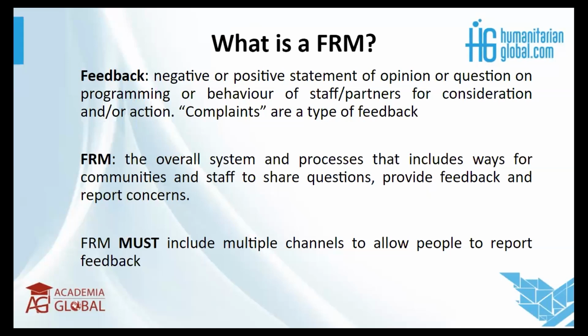It's important to make sure that we have communicated what has been done. Where there are queries such as why have I not been included in certain lists, you still communicate that there are certain criteria, both inclusion and exclusion criteria, that are used to form these lists, and why certain community members have been chosen as beneficiaries and others have not. It's also a matter of communication and being explicit about the type of support that the project is bringing to the community, and not giving false promises, because this is very detrimental. We need to make sure that the community can trust us, that we are keeping to our word and that we are serving them, and they are really the heart of our projects.